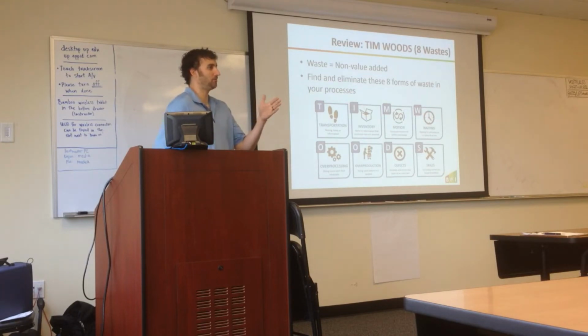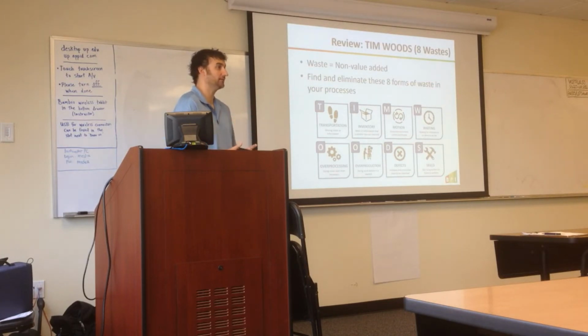But when that number grows to 20, 30, it's really hard to manage those in-process things. You start just tacking on more, and then you have to spend time reprioritizing your list. Where did I leave off with that one? Where's this one at again? So it's even internally keeping your own, it's called work in process, but you're keeping a limit on that.